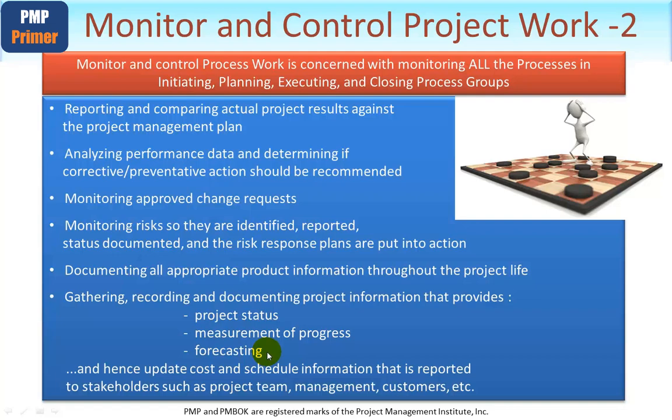Back when I was a project manager, there was a fairly standard form that we needed to consider when reporting back to our management, and that was looking at plan data in terms of cost and time on a monthly basis for the whole of the life of the project and looking at variances, and doing that for both cost and time, and then making comments on risks, issues, any current issues, and giving a forecast of the future as we currently see it in terms of end spend, project end date, key milestones and so on, and then wrapping up by saying within the next month here's what we will have achieved.